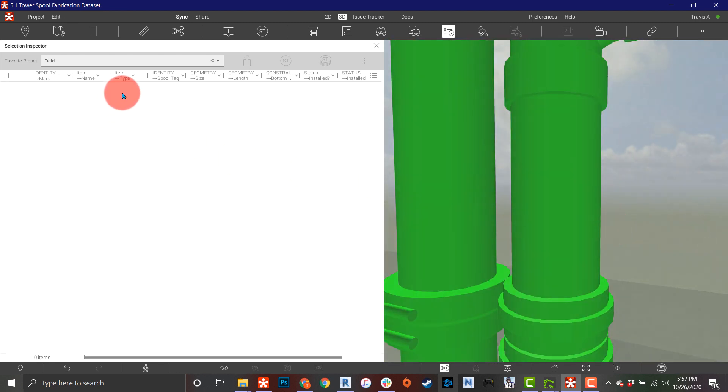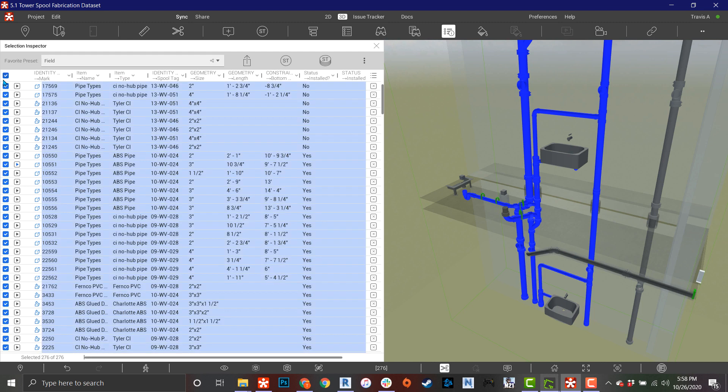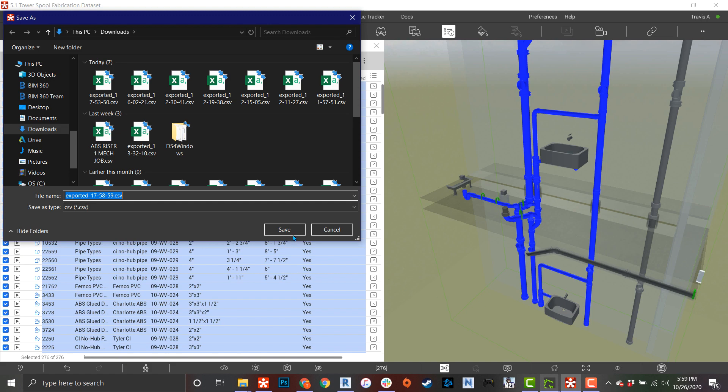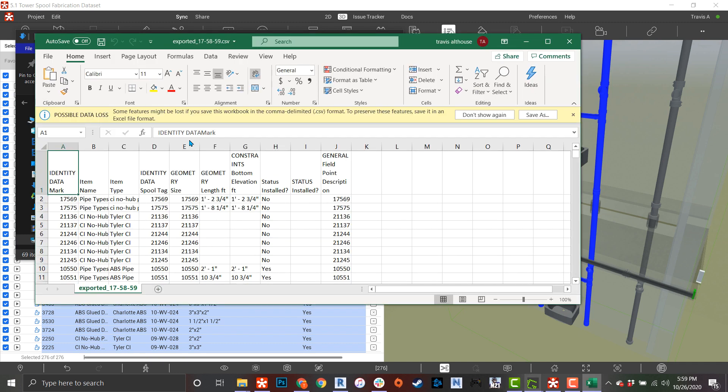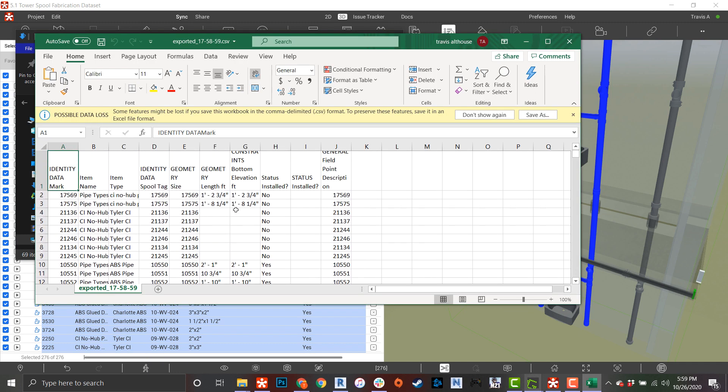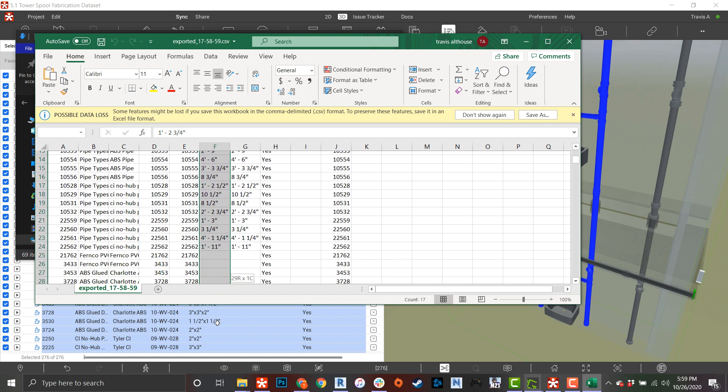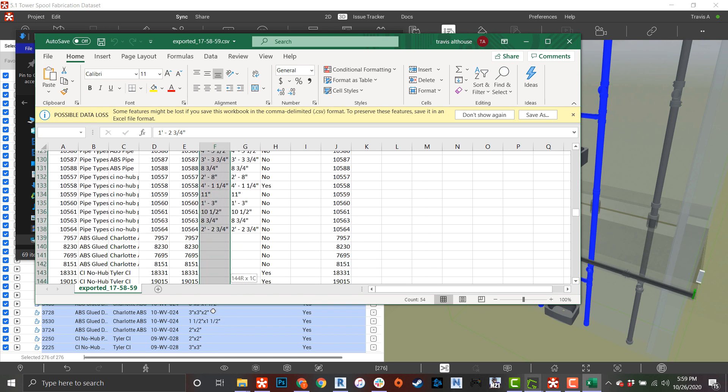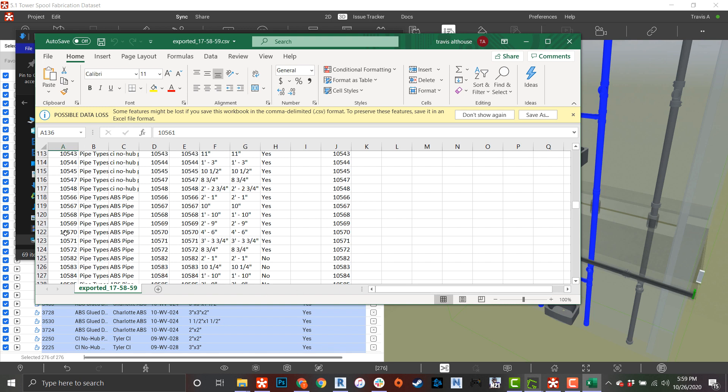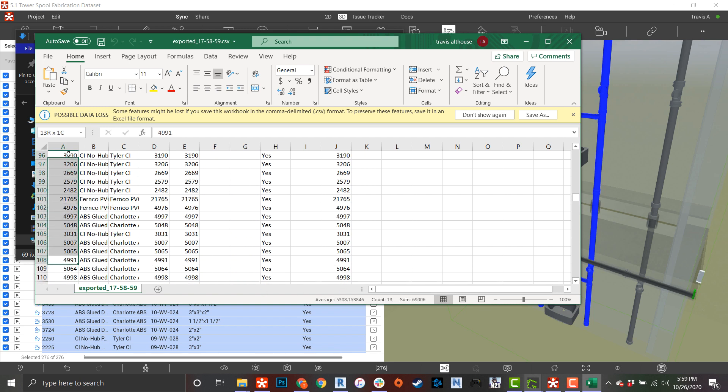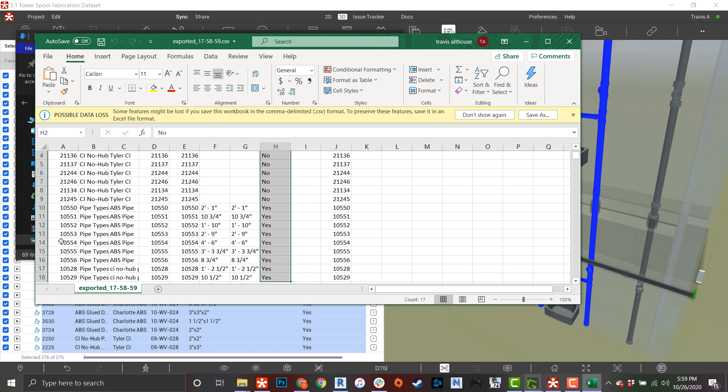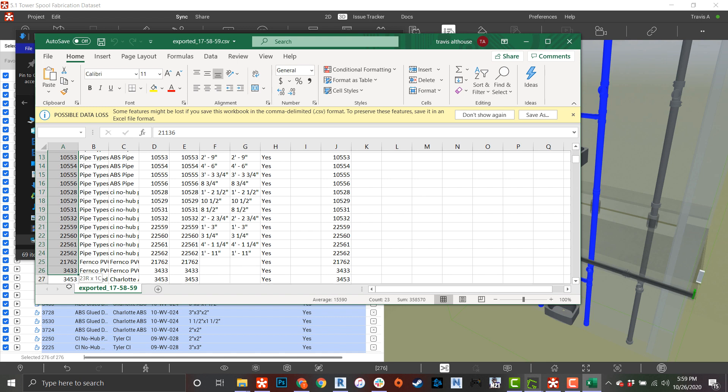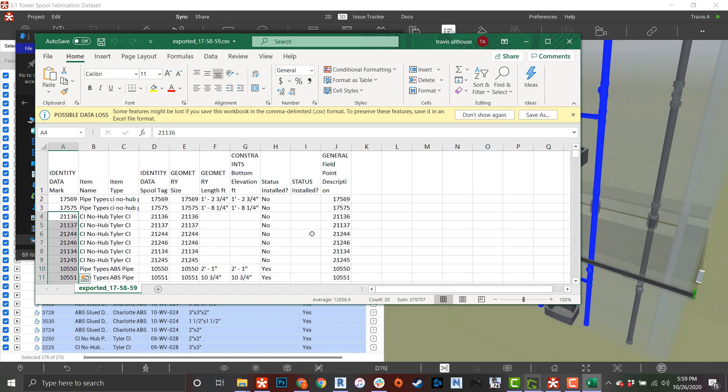What's cool about this is using something like Kobe Data Tools or something - if I export this to CSV and save that and open this up, I could actually run a little macro here to get my cut links. We could actually run a calculation real quick on this row and get all of our linear footage that we need of piping. I could have a direct cut list of pieces and parts I need. Then using something like Kobe tools, my individual parameter for each item is over here - these are unique marks that Revit gives every single piece and part. I could actually map this out and go in and add this status back to Revit via this unique identifier over here. Same thing for anything else you need - if you're adding custom status, RFI numbers, change order stuff - we're able to push those back into our parts.